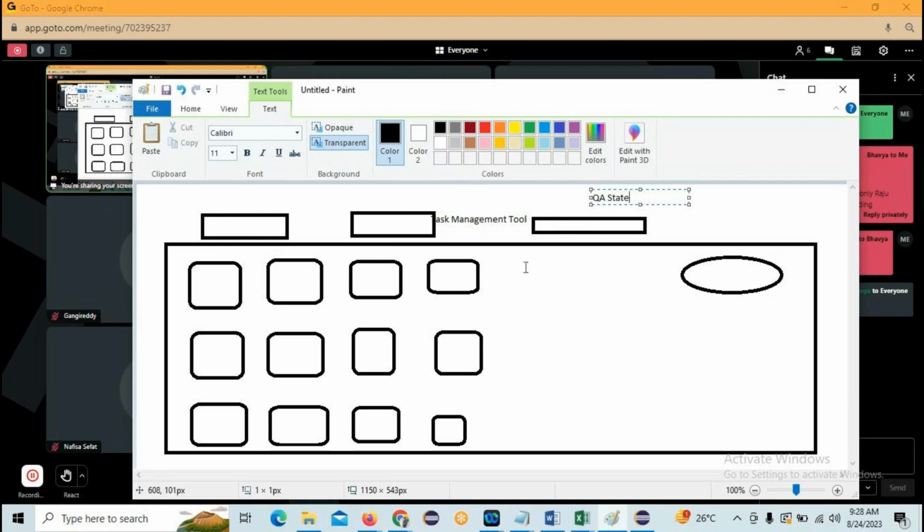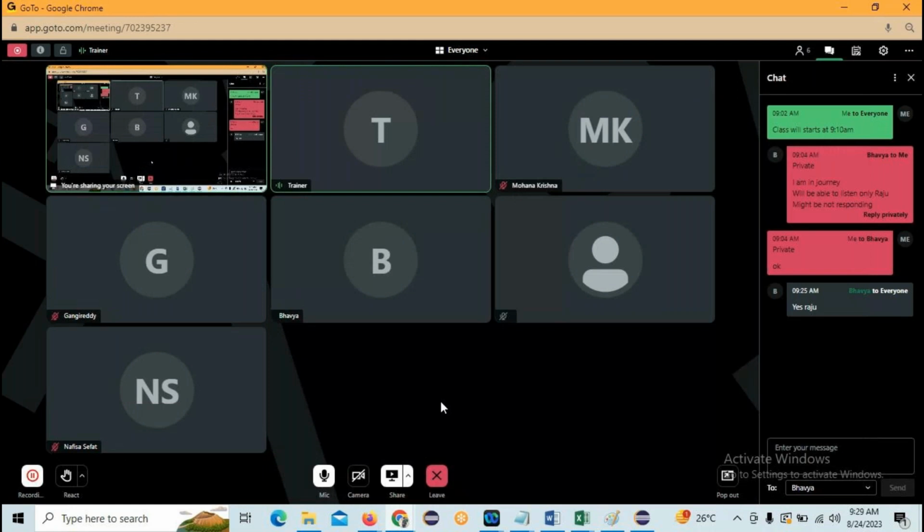We can see these tickets. Once these tickets come from the development state to the QA state, only then will we work on them. Once we execute the tickets under the QA state, if they work fine, then we will move them to the closed state. There will be one more state here, that is the closed state. If it is not working fine, then you will revert it back to the developer. The tickets done within these 15 days are going to be live. But in other models, we have to complete all 90 features and only then move into live. Are you getting the difference between previous models and this model?